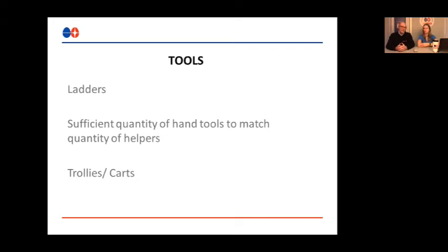And some things that we can't carry with us that are always recommended are things like ladders. Large tools like that. Sometimes customers provide hammer drills. If the customers have a well-stocked maintenance department, we encourage the customers that if they're expecting 3, 4, or 5 people, that we have the appropriate amount of tools to match the quantity of help. That way we don't have to rush out and buy something on day one. We don't have to really share too many tools. Each person can have their own set of tools and not be interrupted in those manners.